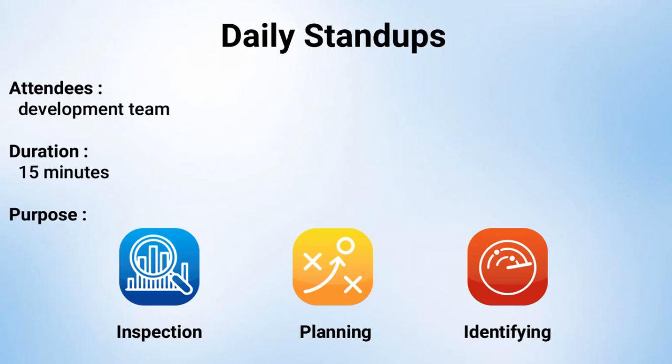It's important that the daily stand-up is a collaborative meeting and not simply a status update. The team collaborates to make the best decisions for the day given the latest information. They usually decide on who will work on specific issues, and plans change slightly after every daily stand-up. This is continuous improvement.